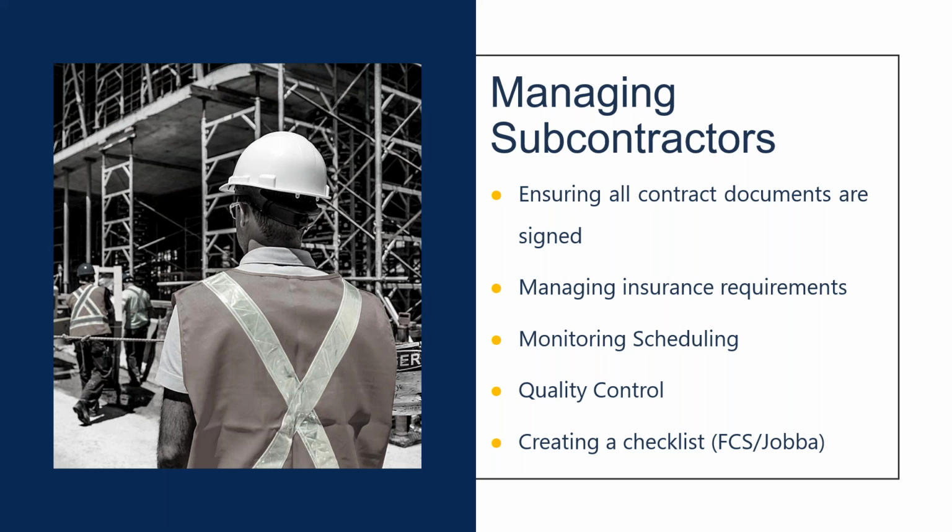Ask for the policy, because if you have the actual policy, it's going to give you some critical information. It's going to give you the name of the insurance company and the contact information for them. It's going to show you the expiration date. It's going to show you the exclusions. Okay, are you getting the Cadillac of insurance, or are you getting the 98 Toyota Corolla?